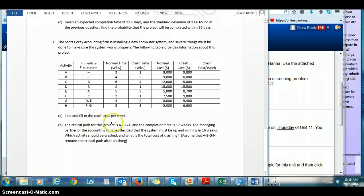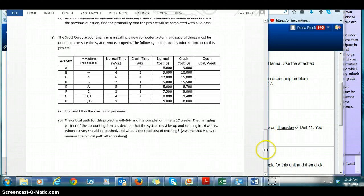Then part B tells you what the critical path is and asks you which project should be, which activity, I'm sorry, which activity should be crashed if you're trying to cut some weeks off. So remember, you'll need to know the critical path in order to determine which activity should be crashed. That's going to be critical information for you.